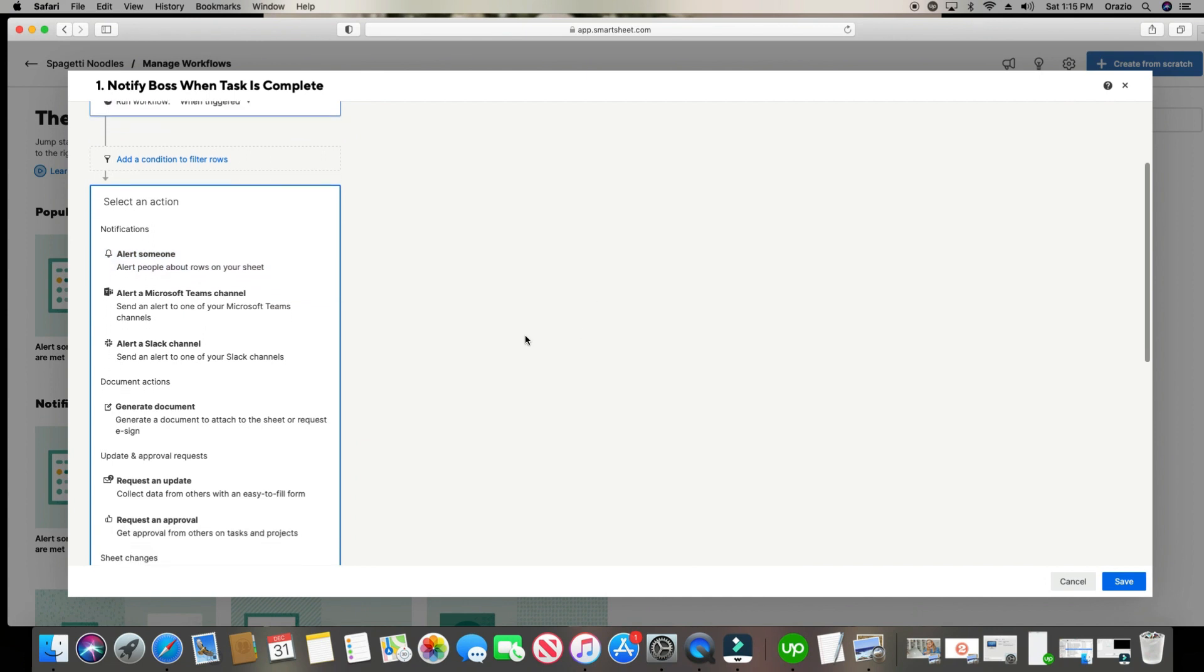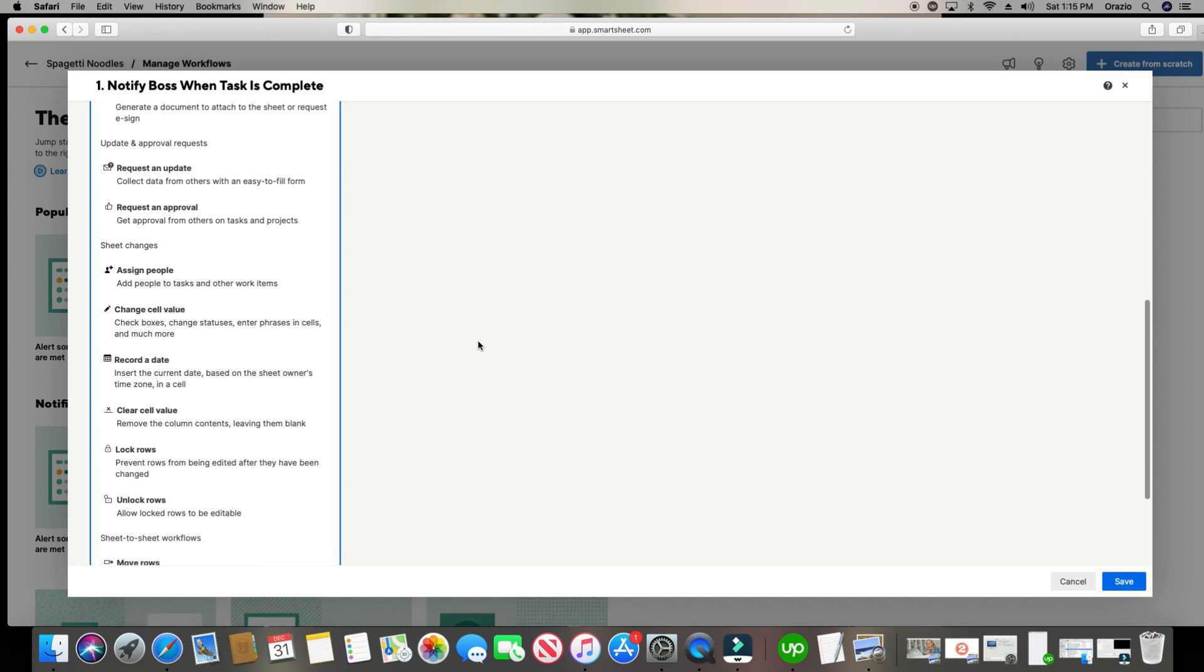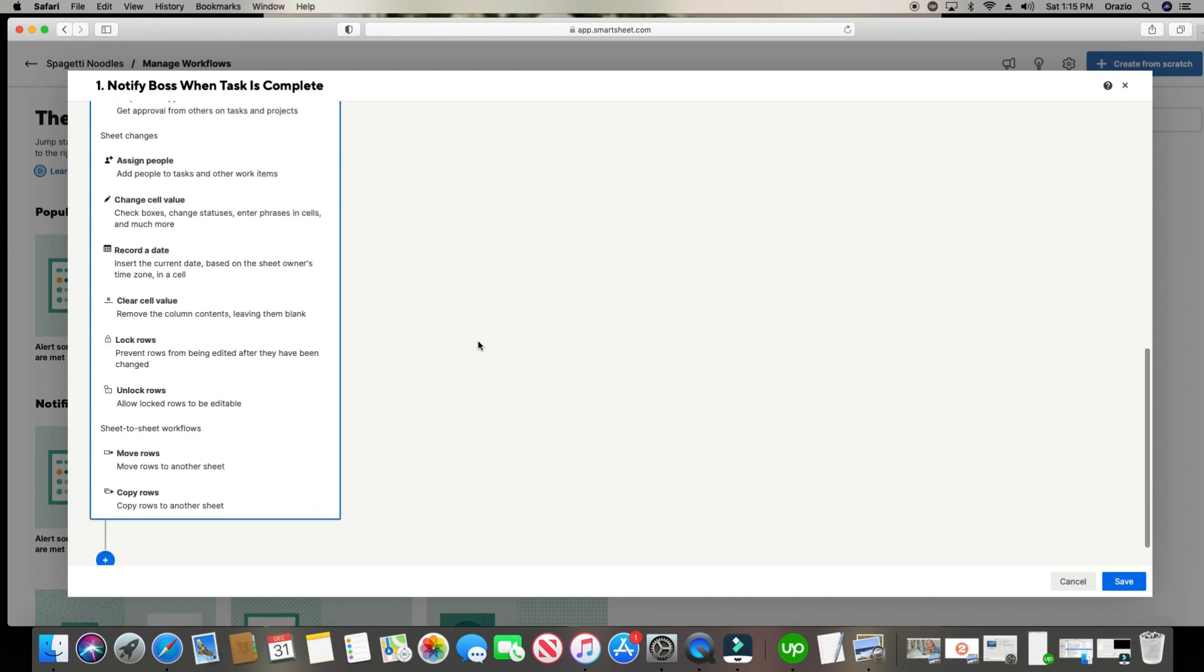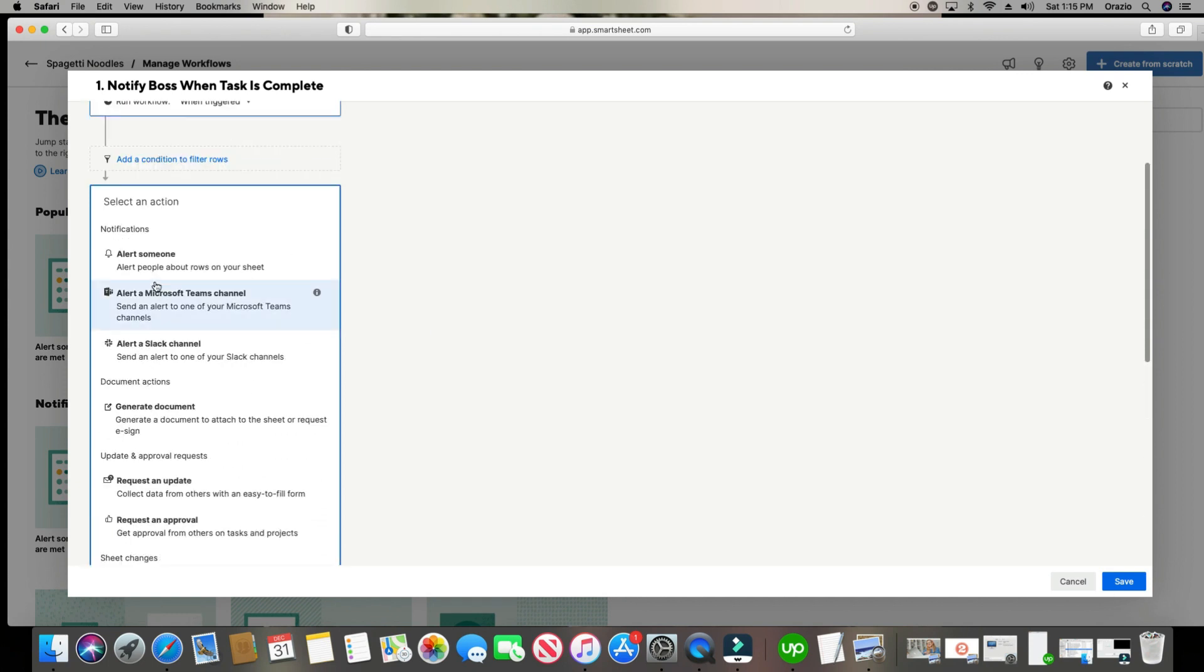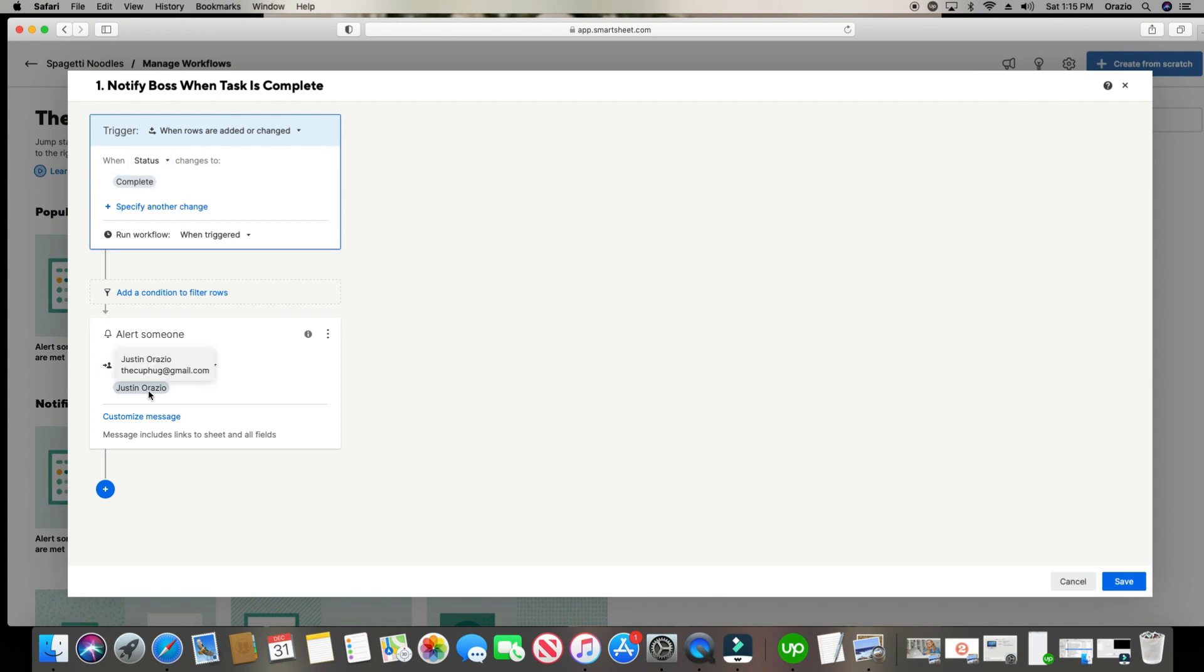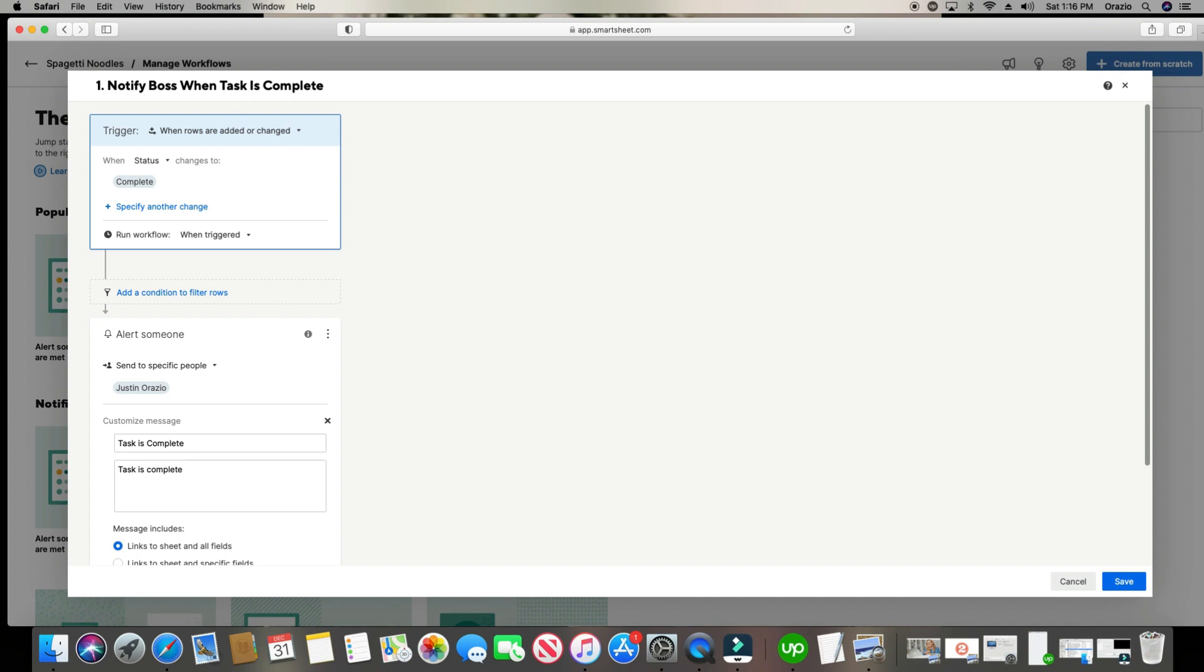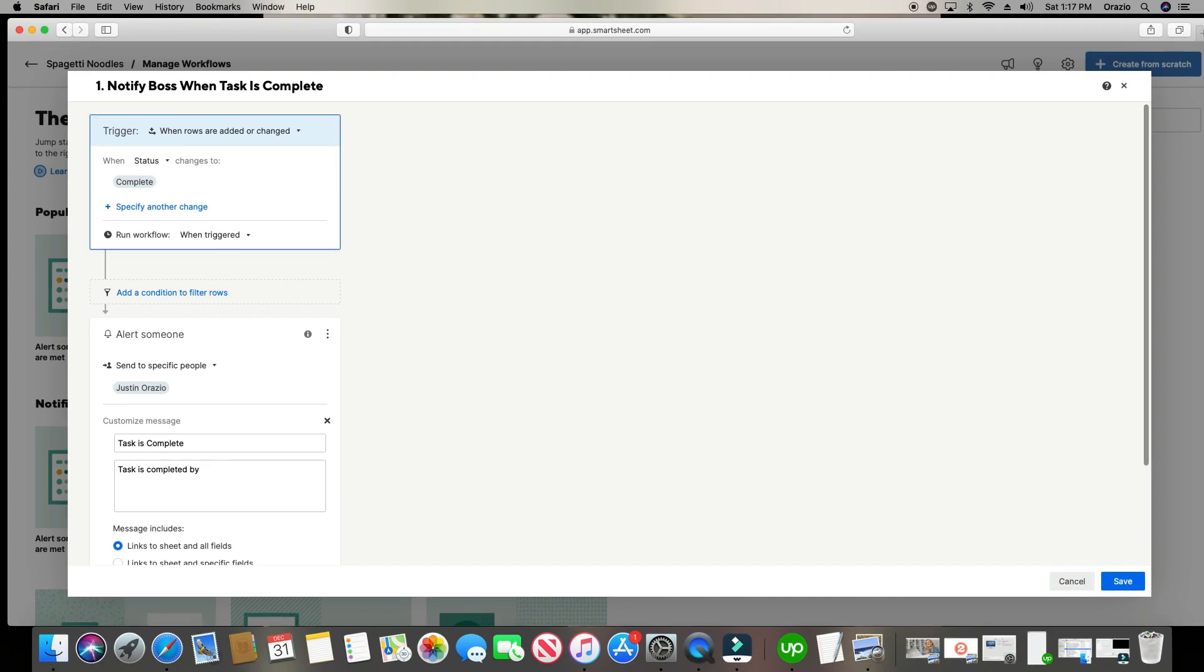So let's go ahead and do the alert. And these are all the different notifications you can do after a trigger is set. But for today, we're just going to simply do the first one, which is alerting somebody. So I just clicked on it. And by default, it chooses Justin Erezio, which is myself. And I'm going to pretend that I'm the boss. And so when the status, when a column status changes to complete, it will automatically alert Justin Erezio. And right here, this is important. You want to click on customize message because when I receive the alert, I don't want to receive a blank alert. I'll have no idea what that means. I need a subject and a little message letting me know what this alert is all about. So we'll say task is complete. And then that'll be my subject. And then down here in the message, I can give a little more detail.